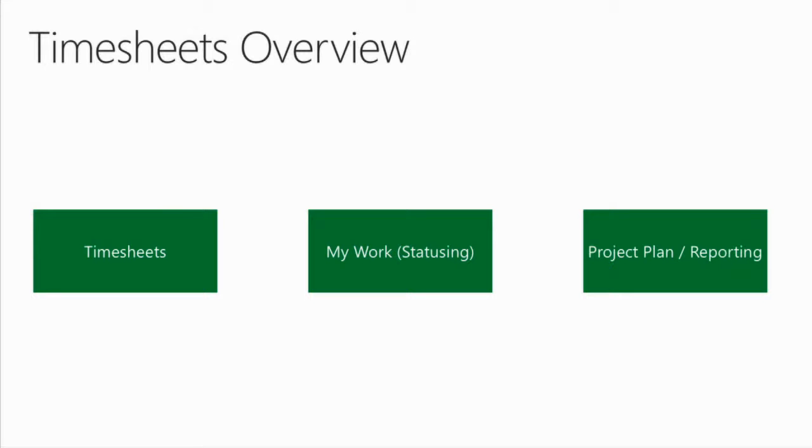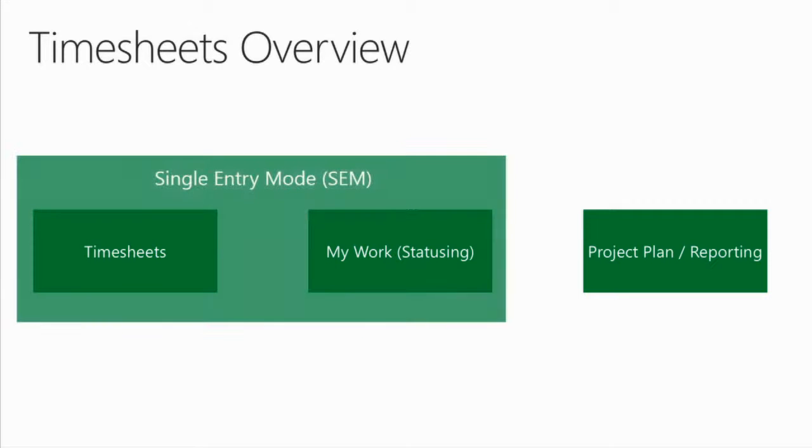So for the project manager, when he opens up the project plan, he can now see the work across all of his resources and determine work slippage or impact based on product deliverables, based on the task progress information that he receives. And since timesheet data and statusing data can be fairly similar, what we introduced in 2010 is what we call single entry mode.